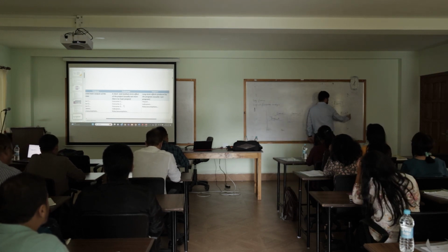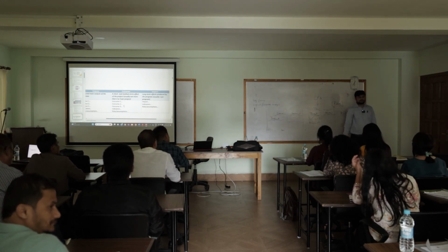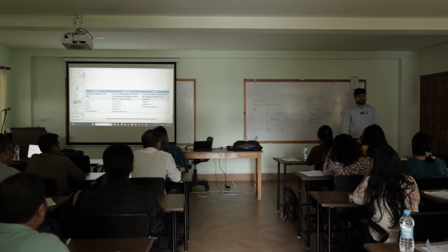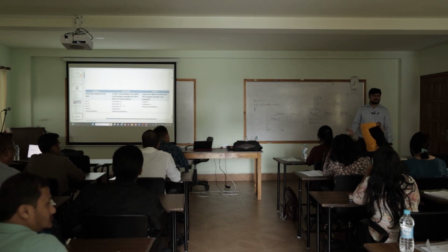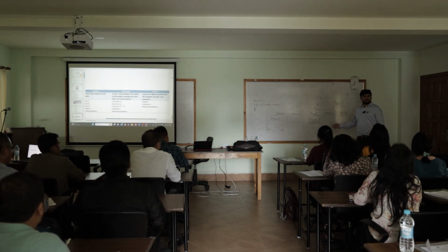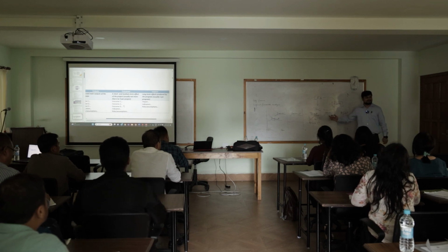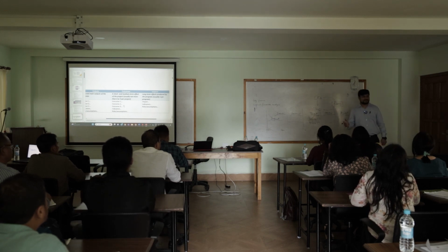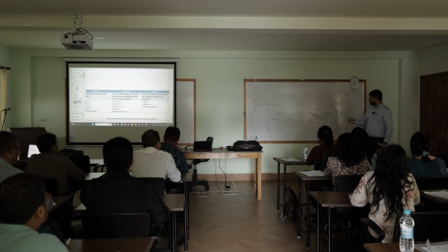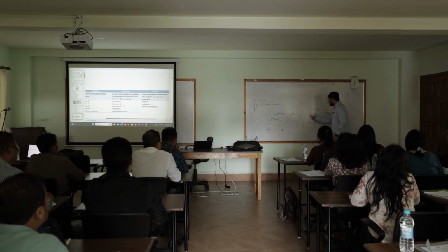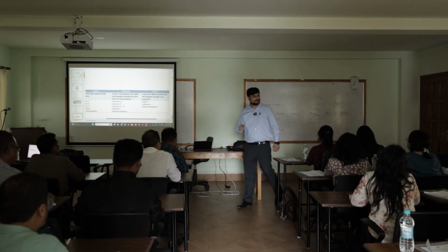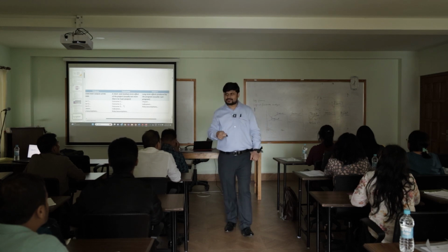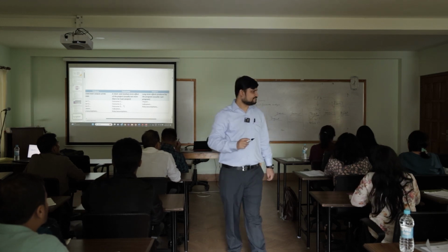Target, means of verification, risks and assumptions also. So you've covered everything in the RBM or results framework. Why is it called a results framework? Because it's just a matrix. A fancy term for a matrix would be a framework, right? And we are simply talking about results, or getting to the target. It's a top-down approach. We think about the targets first in a results framework, and then move into what could be the outcomes, the outputs, and the activities that need to follow with it.